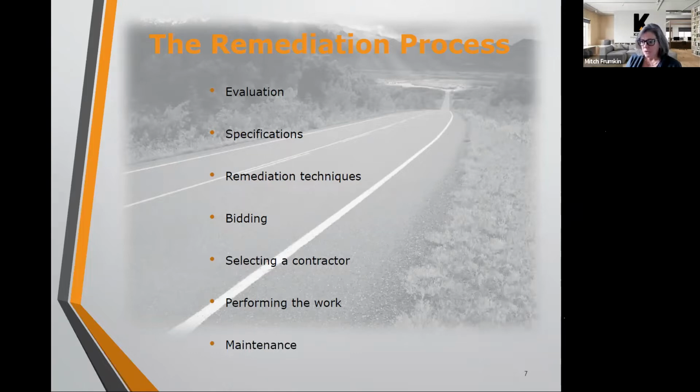So we add those line items to give you a range, because we don't know what the percentage of those extras will be, because there are unforeseen conditions in a pavement project. There are a lot of things you can't see until that top course is milled off, and we'll talk about that a little bit.